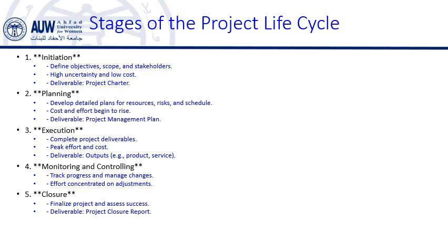By this point, all deliverables should be in place and the project is winding down. For example, in a marketing campaign or event management project, closure involves finalizing all invoices, completing the post-event analysis, and gathering feedback from attendees and stakeholders.